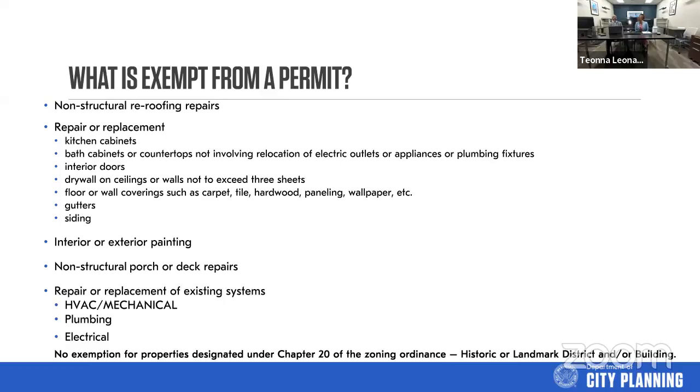And one thing we do want to point out at the bottom is that historic districts and SPI districts and landmark districts are not included in this exemption. So those within a historic district or landmark district and SPI districts still require you to get a permit regardless of the type of work you're doing. They have to see.